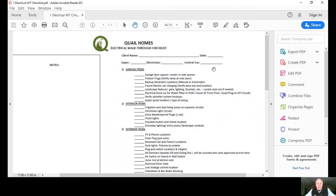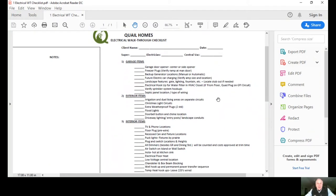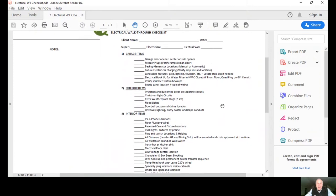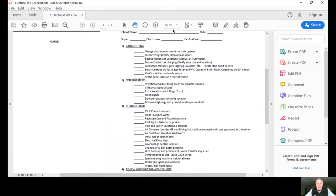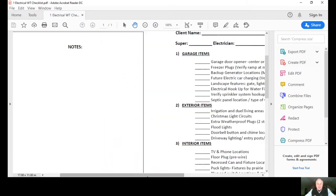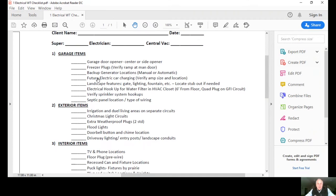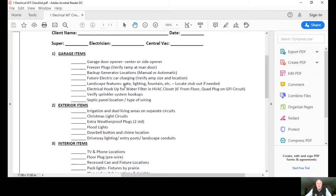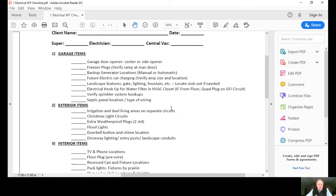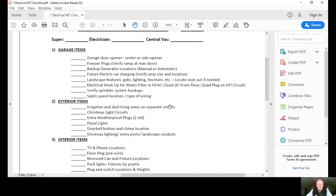We'll start first with the garage items. Let me get this a little bit bigger for us. You can see we'll review the garage door opener, the freezer plugs, if there's a generator, how we want to treat that manual or automatic on a generator, future electric car charging if you decide ever to use an electric car, any type of landscape features whether it's a gate, lighting, a fountain. We want to make sure we accommodate for that.